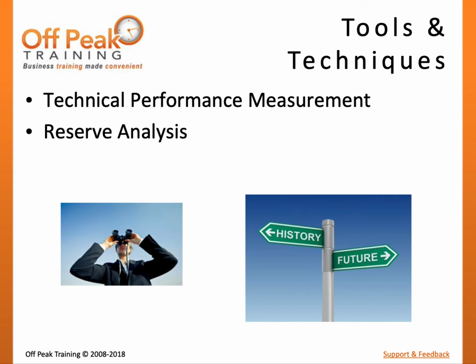If the team is experiencing challenges, such as technical challenges, there may be risks involved in not fulfilling product requirements. This can lead to either a lack of customer satisfaction or extend the schedule or budget in attempts to overcome the challenges. In the context of controlling risk, the idea is to use these performance measurements as a basis to understand if risks are occurring or if new risks need to be identified.